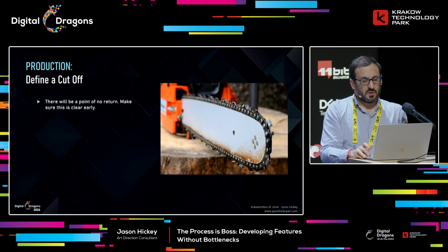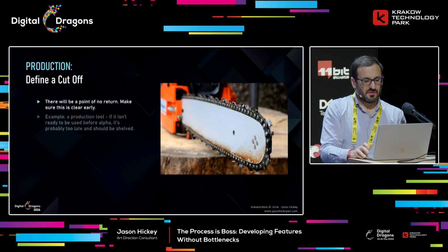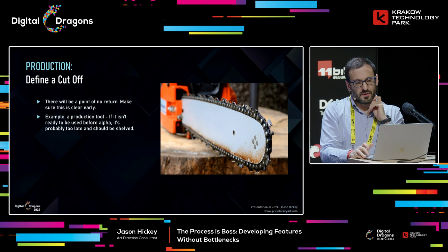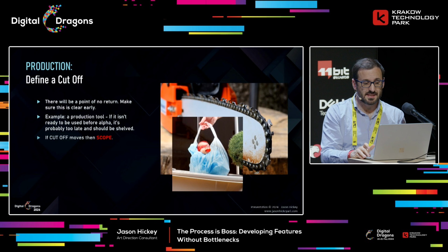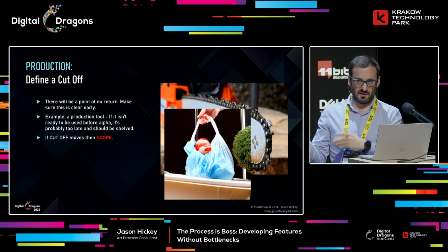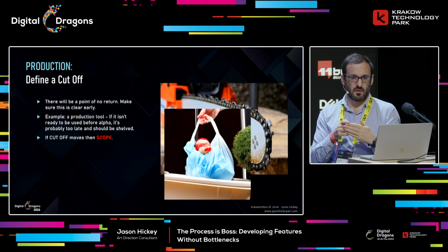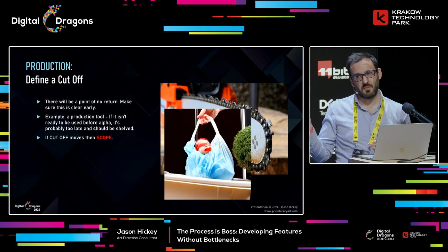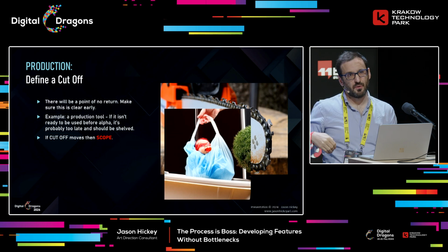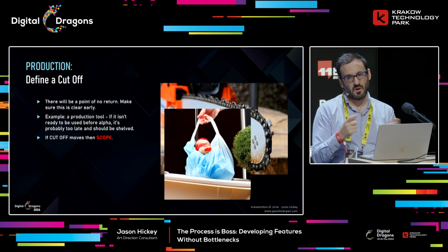With all of this, it's important to make sure that, like I talked about before, there is a point of no return. Once that cutoff is met, you're going to have to cut probably, but you can still move the deadline or scope. You need to think, okay, what are the knock-on effects on the rest of the departments? Or what are we going to drop off the game in order to get this done now? Is it worth it? All that stuff.